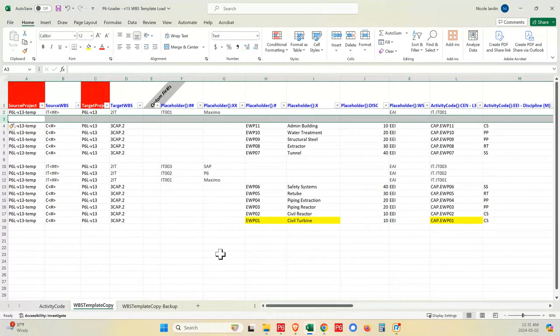So if you're doing a turnaround, you might have thousands of work orders to load, and they might be different types of work orders. So you can call different templates. So that works fantastic. And in this IT program that I've been working on, that's exactly what we did. We had different kinds of work scopes, different lists of things we're doing. I'm talking about hundreds and hundreds of lists. So building out the schedule can literally take you only a few hours.